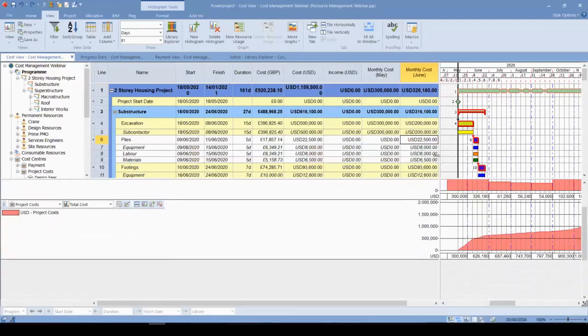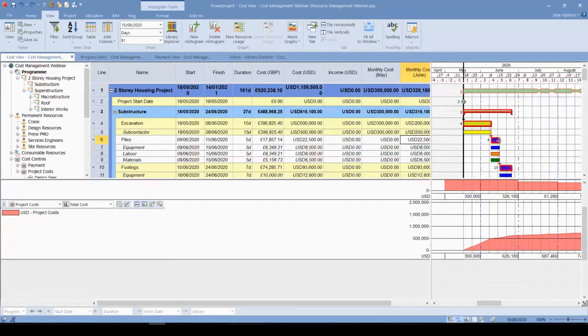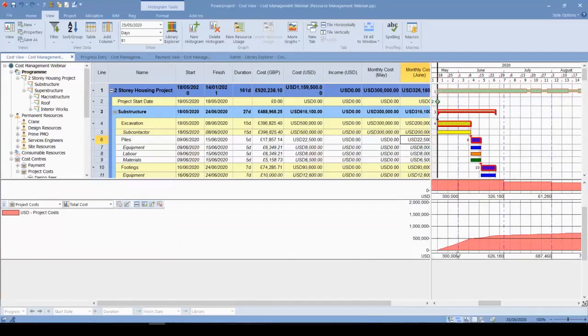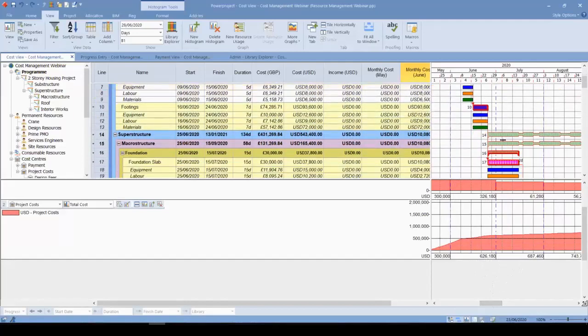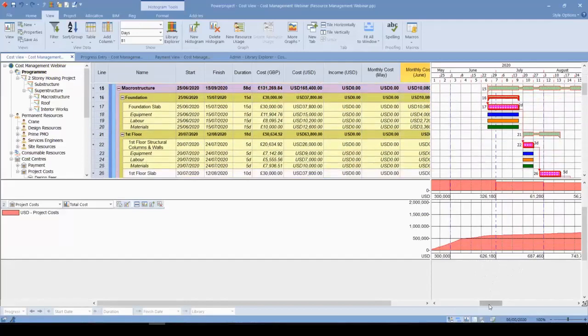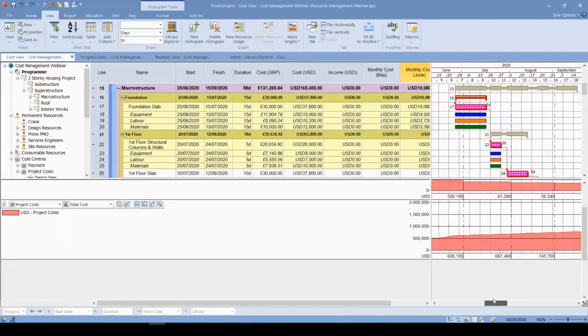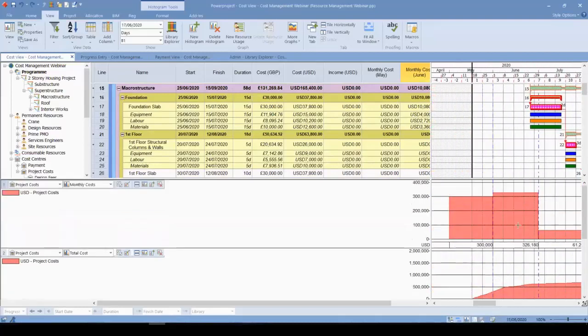And you can see, of course, also the cumulative costs. You can see that 300 is at the end of May, but at the end of June, it will be the addition of 300 and 326. You can see the cumulative costs, and according to my schedule, how it is generating my cost, how it increases, I can control this information with the histograms.